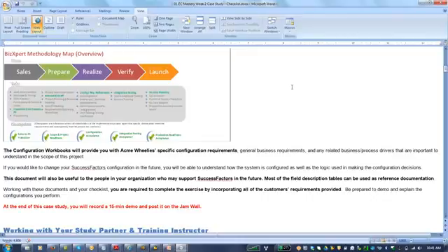Once it is signed off, we go on to the next phase, the realization phase, wherein whatever is there in the configuration workbook, we configure in the provisioning and also in the instance. Typically an implementation will have a certified professional services consultant who has provisioning system access. He will enable all the switches or whatever functionality is needed by the business, in sync with them first.